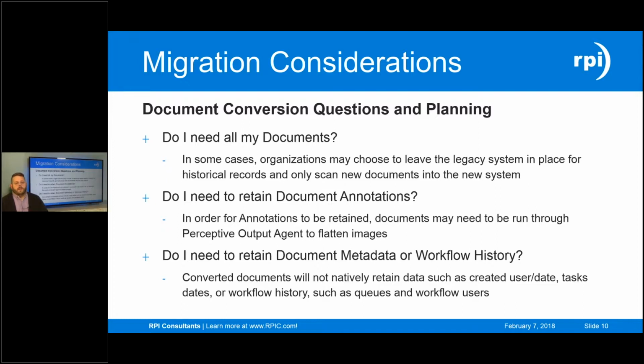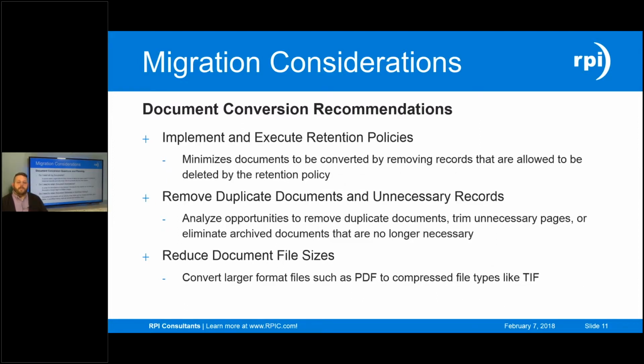Okay, for your document conversion, a few pieces of advice. Number one, and I think this is probably the most critical, implement and execute retention policies. I can't tell you how many implementations I've done where the business is all too willing to kick the can on implementing the retention policies because that's 5, 7, 10 years down the road. I don't need to worry about that right now. Well, now we're 5, 7, 10 years down the road.